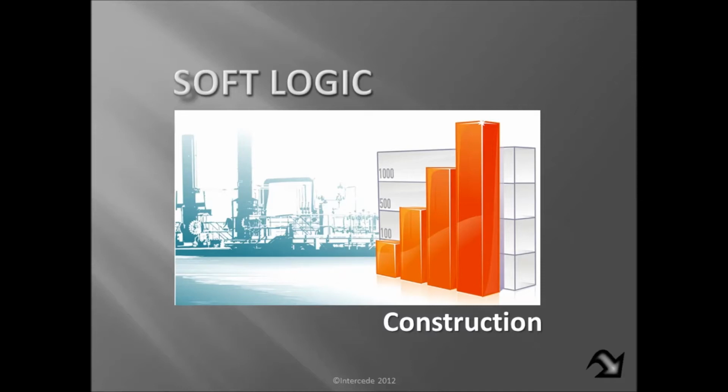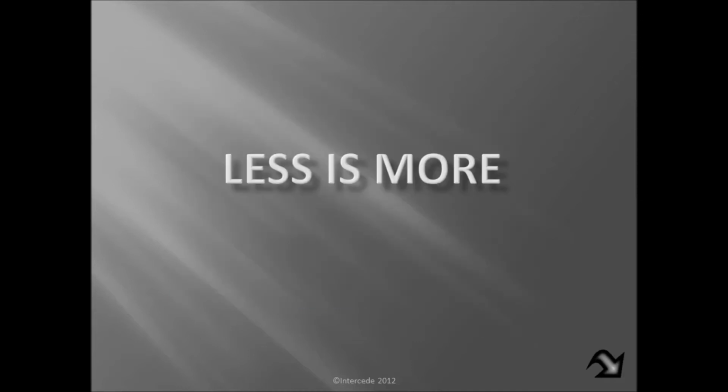But again, as you might have noticed, as we're moving through these three phases, the elements that we have to control are becoming more voluminous, more complex. And so it's even more important that we adhere to the watchwords for SoftLogic, in which less is more. We want to take as much detail off the schedule so that there's greater visibility to those elements that really do require a rigid installation sequence and monitoring, because that's more likely where your critical path is going to be.